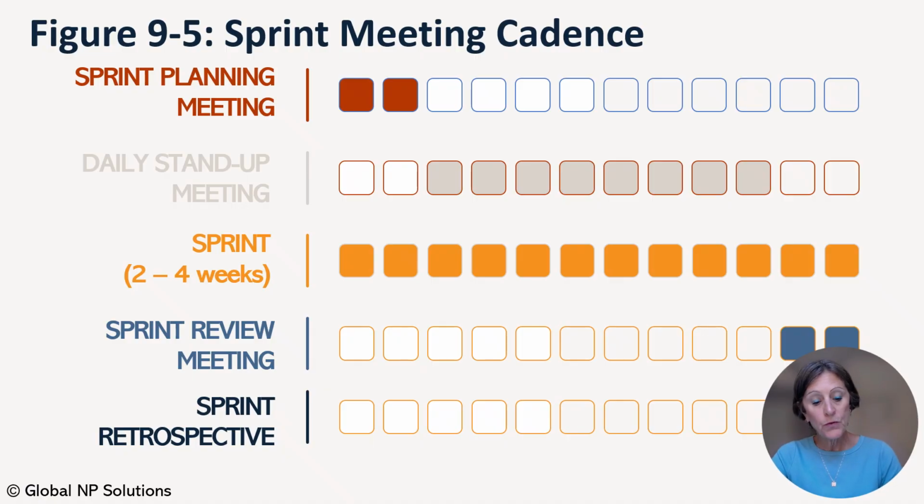Most Scrum teams fix the length of a sprint for the duration of a project. Some Agile and most hybrid NPD processes allow fluctuation in the length of a sprint to account for varying task complexity throughout the life of a project. The cadence of ceremonies is not changed by the length of the sprint, but the length of a meeting should be adjusted for the length of the sprint, except for the daily stand-up meeting.